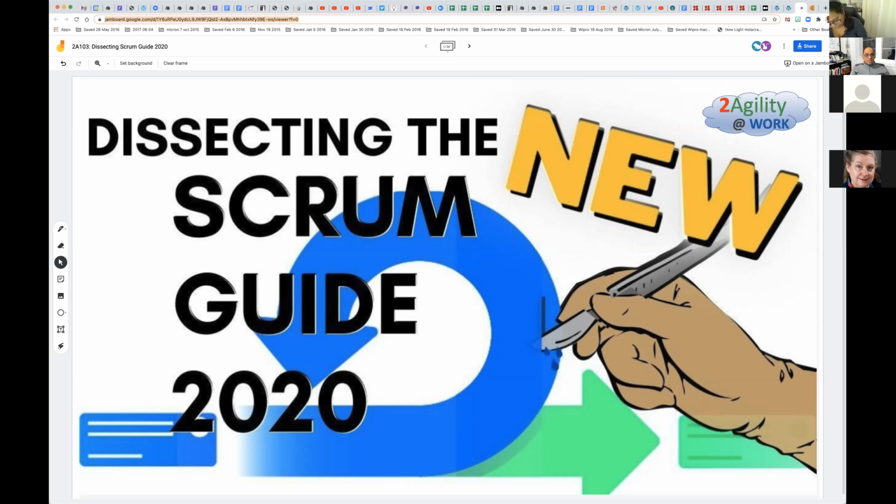The guide also says that if the Scrum teams become too large, they should consider reorganization into multiple cohesive Scrum teams. So eventually, as in the picture on the right, if the team becomes too large, then the teams would break into smaller teams, each focused on the same product, so the same product owner and product backlog. And therefore they should also share the same product goal, product backlog, and product owner.